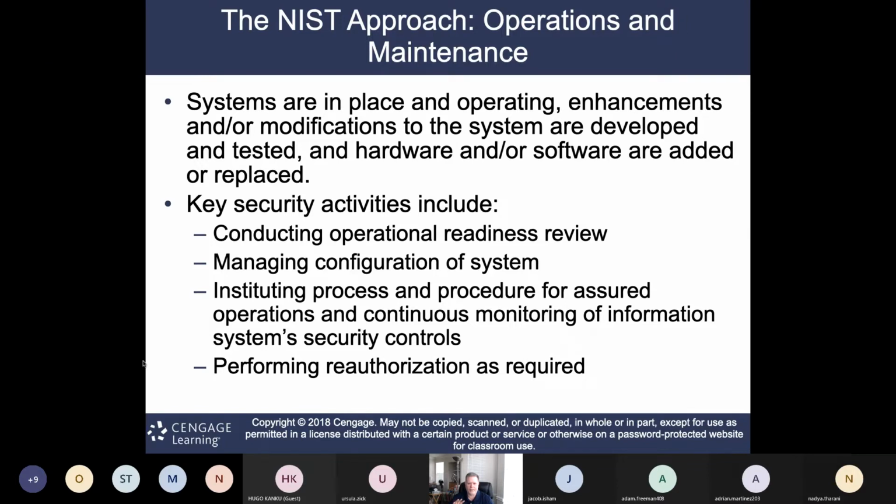Very simple. You still go through a change review board. But anything major, like say an upgrade to the app, the app had a version change, that might require its own little reauthorization project and go through the whole phases to do the upgrade because it's a major substantial change.